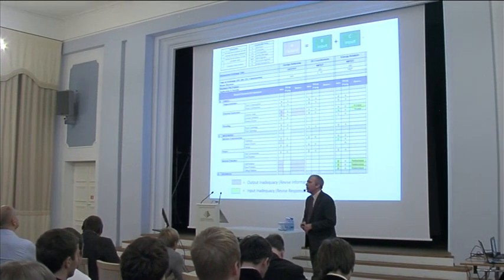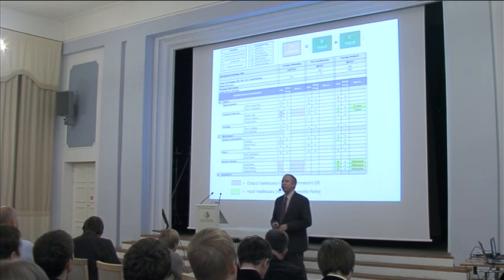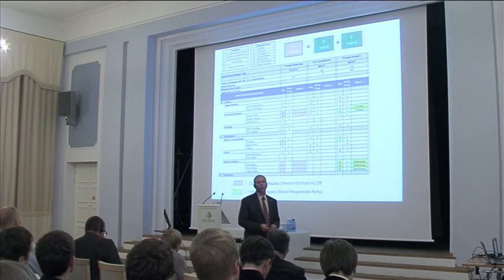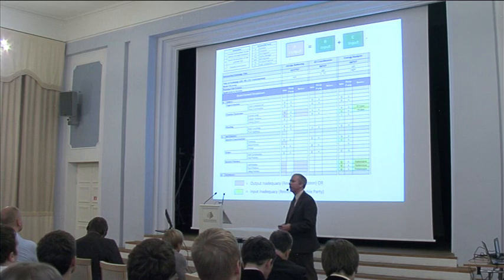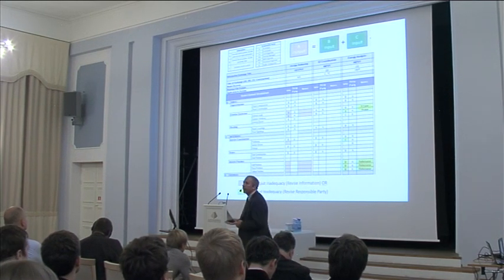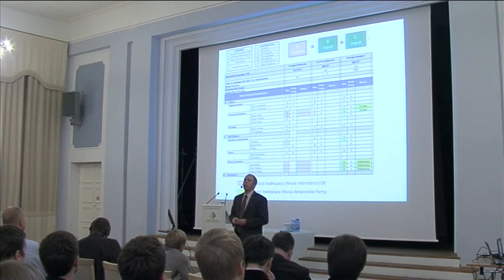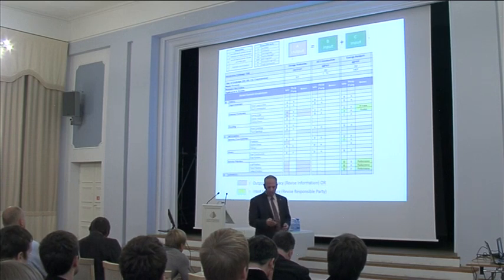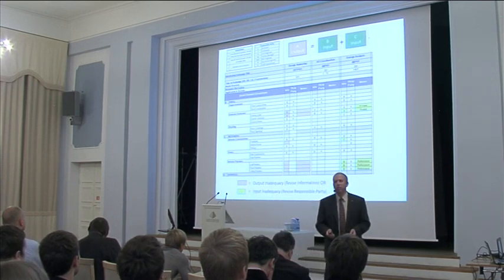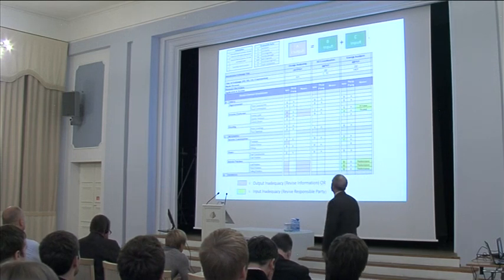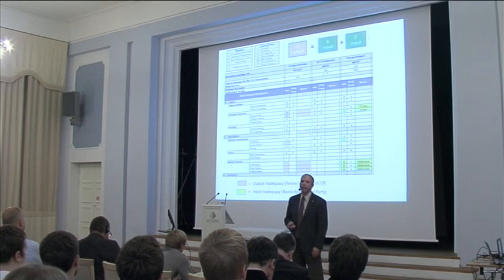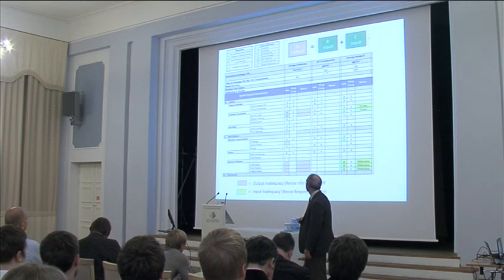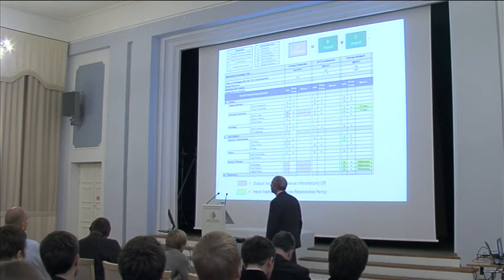And we put together a template. Now, this is by no means the only template that's out there to do this, and in fact, we're considering changing this particular template in the next version of the guide. But this is a really simple format for looking at the different scopes of work or different systems that are in a building. And this is modeled off of a US categorization system called the OmniClass tables, where we have different systems here: superstructure, enclosure, roofing, interior construction.